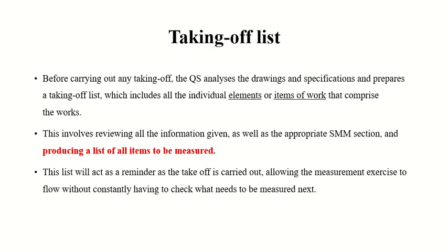Then the contractor will fight: I have an extra item, your BOQ did not have it. Now some contractors are very naughty. They will say, it's not in the BOQ, I will not do it. They will finish the project, you will know in the end that we didn't do this, and he will tell you it was not in your list. So that's why the list is important, and it also helps you with the measurement process itself.